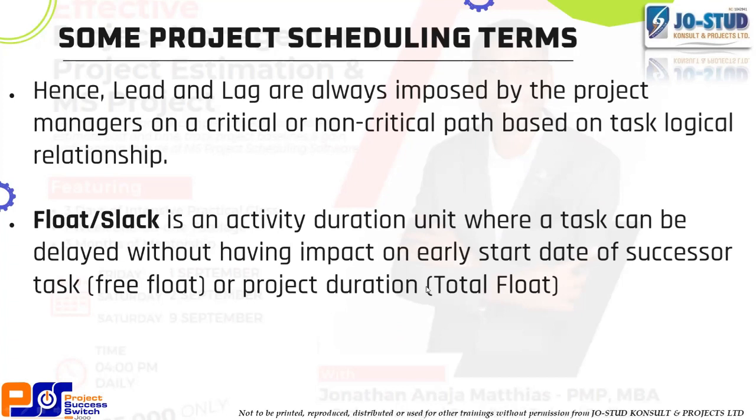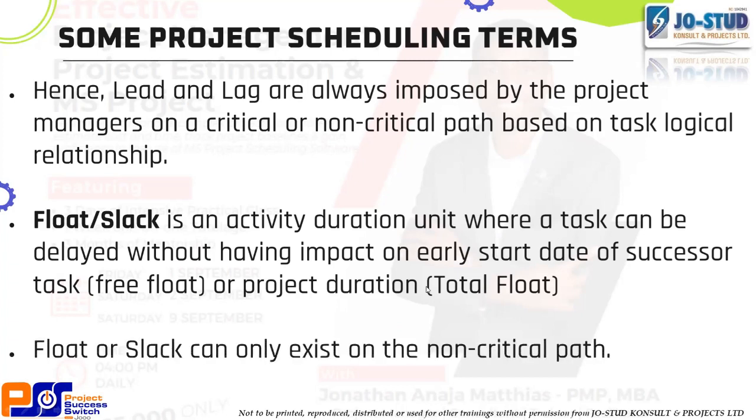Now, when you say float or slack, is the activity duration that once you apply a lag on, lag is the amount of time you can delay, right? What is the difference between lag and float? Lag is the amount of time you can delay a successor activity. But float is the amount of time you can delay a successor activity that will not affect your project duration. The moment it begins to affect your project duration, it tells you that you should be careful how you apply your lag.